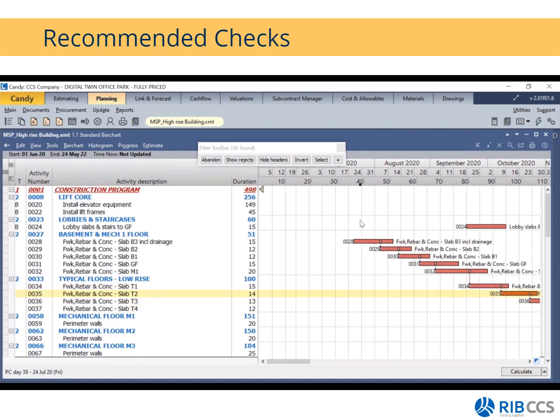All right, if you have a B-type activity, and if there's no succeeding activity that's going to happen after it, you can introduce things such as snagging or handover or whatever the case is, and then just link it to that last final check that you would like to do before the actual contractual handover date. So that is for your B-type activities.